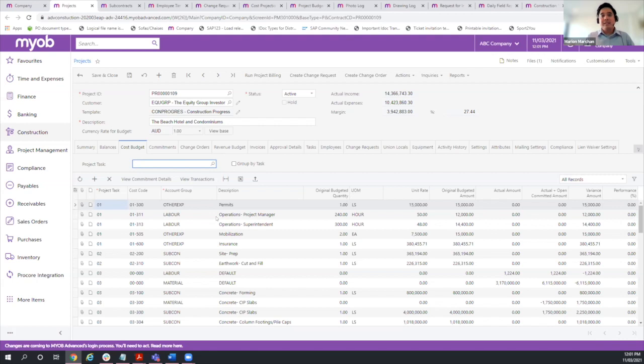So in advance you can predefine those, so you can quickly identify that an expense for a particular subcontractor should land on a particular natural account, and the project itself will be able to capture that to the correct cost. So there's no manual intervention that you need to do to get that posted. So it's like grouping things for you to see a balance, right, of where things are.